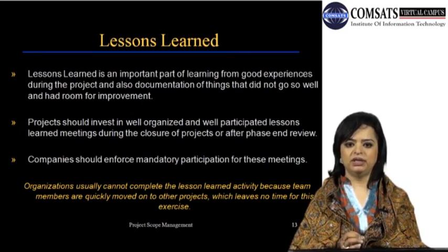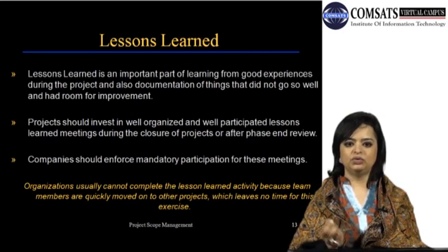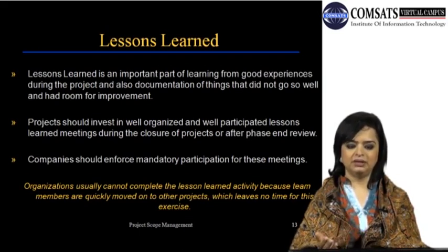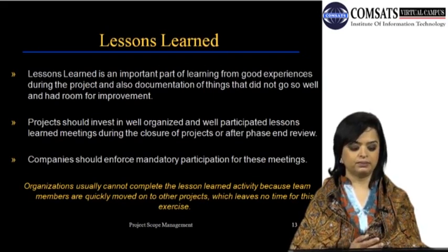If it is part of the WBS and there are hours associated and a participation list included of who will be attending these meetings, then it puts a responsibility on a project manager to ensure participation and to mark off who attended versus who did not attend. And then there should also be a line item in the WBS stating that the whole process is documented and then communicated for further use and processing.